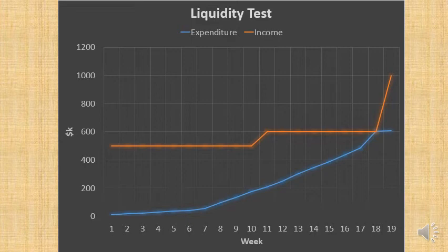Of course, the two lines are now touching one another, so that's less than ideal, because if you have just a small delay, if the project construction is closed for 1 week because of rain, or if there's a pandemic, or what happens if one of the work packages actually costs a bit more than you expected, suddenly you've got the same problem all over again.